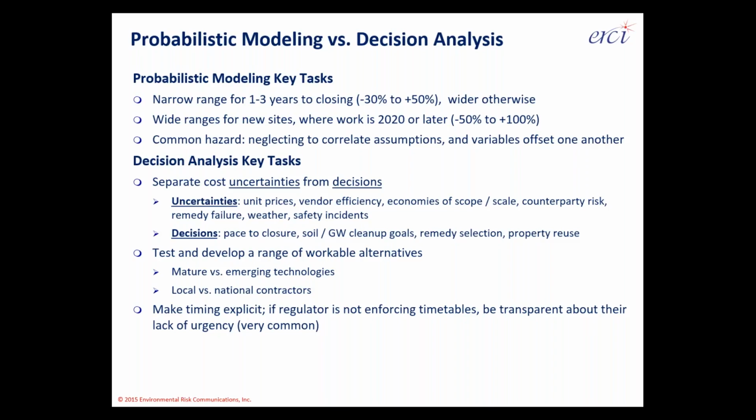Make sure, again, you've got a great set of workable alternatives, that you're evaluating both mature and emerging technologies, looking at local versus nationwide contractors, and again, be very clear about timing. It's absolutely important to make sure that everyone's clear that the exciting cleanups where things had to be done on an urgent, emergency, expedited basis, hopefully most of those cleanups are done and gone, but there's a matter today of prioritization: if you have finite resources, which cleanups do you want to pursue first, which liabilities do you want to extinguish first versus those that can wait.